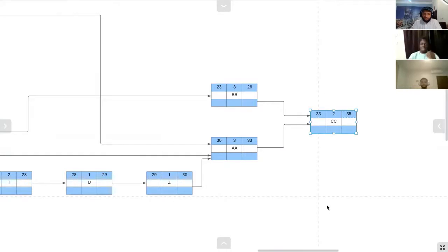Okay. To find the critical path after all of that, we are going to go through all of these tasks again, but backward. So in this case, you're going to take the smallest number from the previous tasks, okay? This task should finish at 35, however, okay? So it also should start at 33 here, 33, okay?